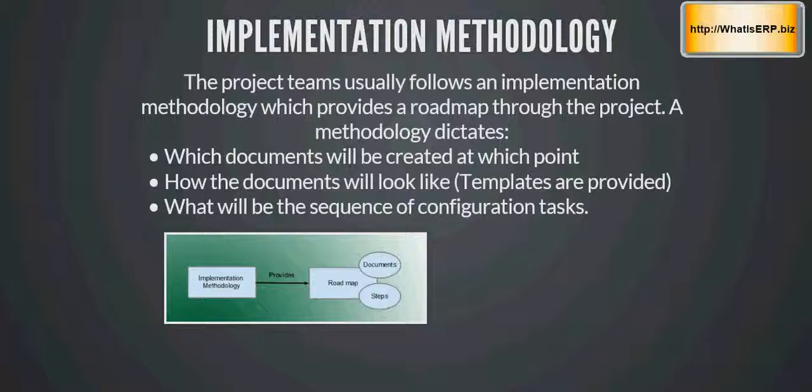Methodology is a series of steps that a person will be taking to implement an ERP software. Methodology is not something that is married to the ERP software. In fact, it is proprietary to the consulting company. One consulting company can use its own methodology to implement the same ERP project that would be implemented using a different methodology by another consulting company. Methodology can be considered as a set of documents and a series of steps. So all the important document templates are included in the methodology, for example, project plan, the configuration document, test scripts, and so on. So methodology does give you document templates, but it's not really just the documents. It is a little bit more than that as well.